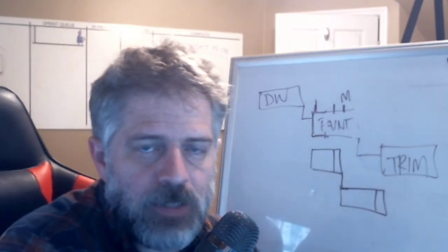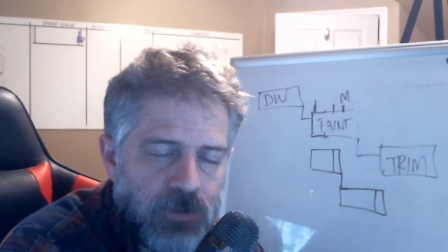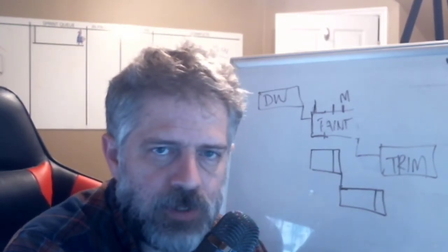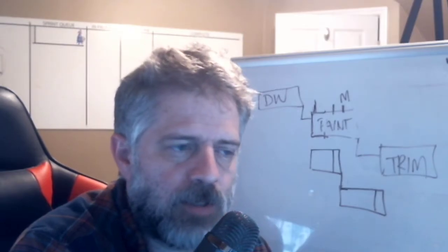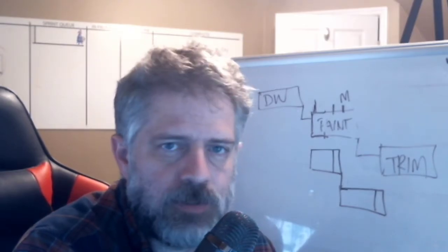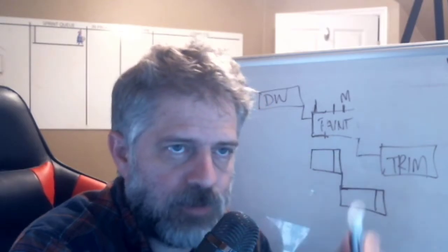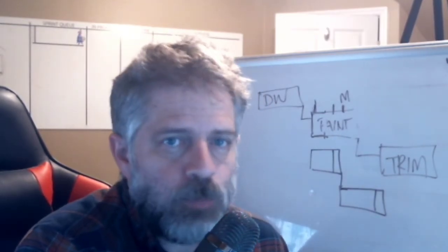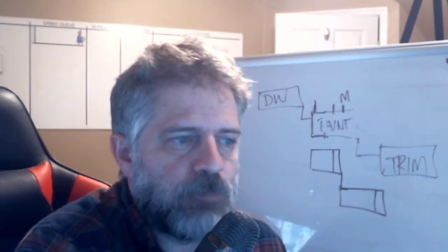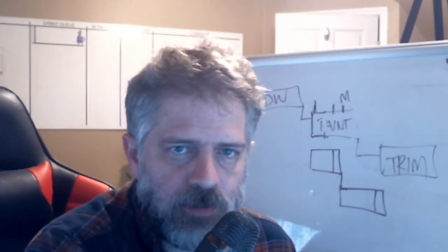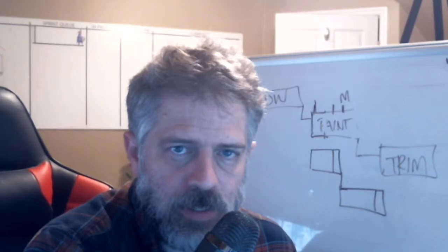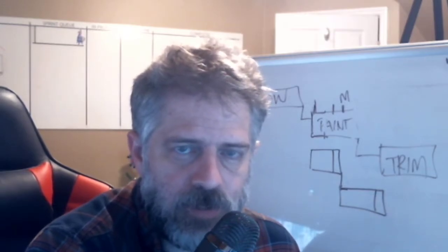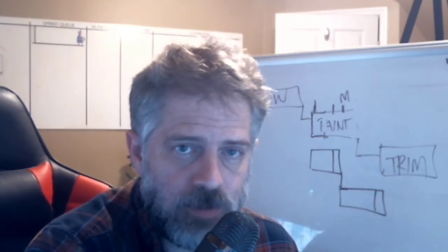When you talk to the painting contractor and he's looking at the job, go back to that first conversation when he's there to look at the job, and you ask him, how long do you think this job will take? And in his mind, he thinks, well, 4 days, but I'll tell Dave 6, which is very appropriate. You need some margin in the system, but you need to isolate and locate the margin. And everybody in the system needs to understand where the margin is located and what you're watching.